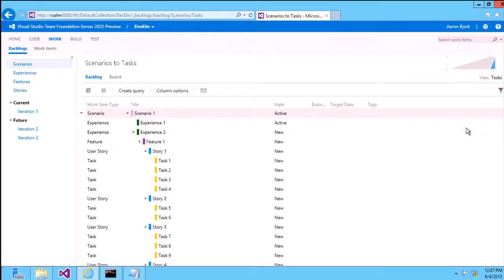Our teams are always thinking 3 sprints ahead. So that's something that we do. And I'll show you the mechanics of that. I've always got a plan in my head for where we're going to get in the next 3 sprints. For us, a sprint is 3 weeks, so that's 9 weeks ahead. And I always have an idea as a product owner of where I want to be. Now, how am I validating that estimate? I'm talking to the guys on my team. I'm talking to the product owners.